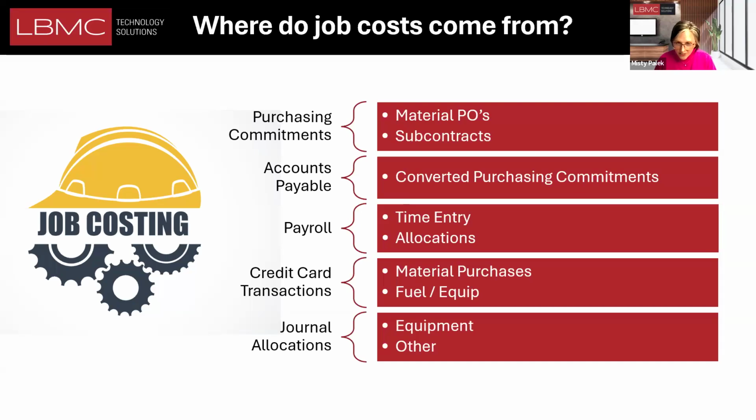And they're really important for predicting the future of the job. To understand, scheduling is also important based on subcontracts and purchase materials, that those drive those schedules. A project schedule will be driven by purchasing commitments, because we need to know when the material is delivered, when the subcontractor is going to be done,